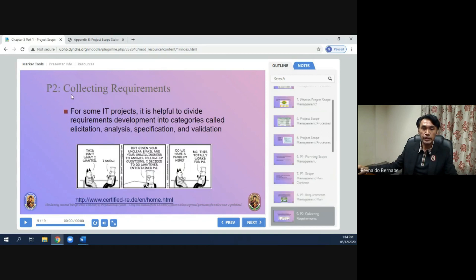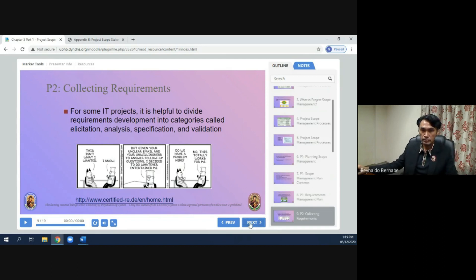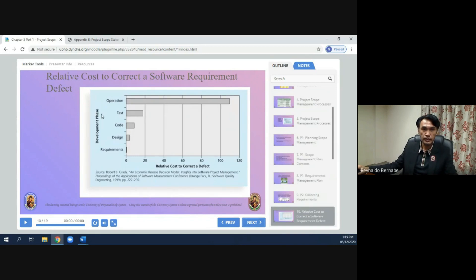In phase two — collecting requirements — for some IT projects it is helpful to divide requirements development into categories called elicitation, analysis, specification, and validation. The development phases are: requirement, design, code, test, and operation. This illustrates the relative cost to correct a software requirement defect at each phase.